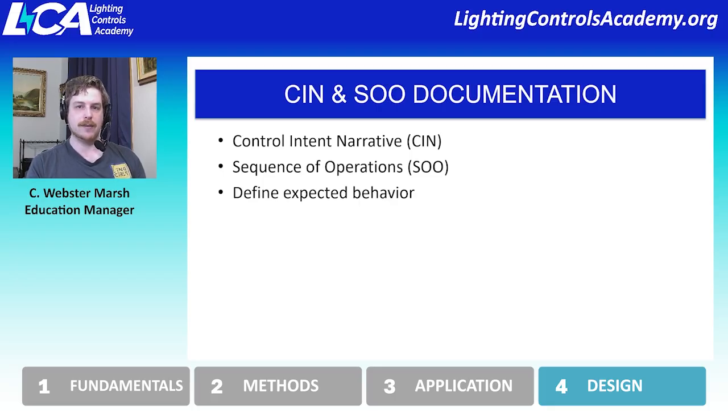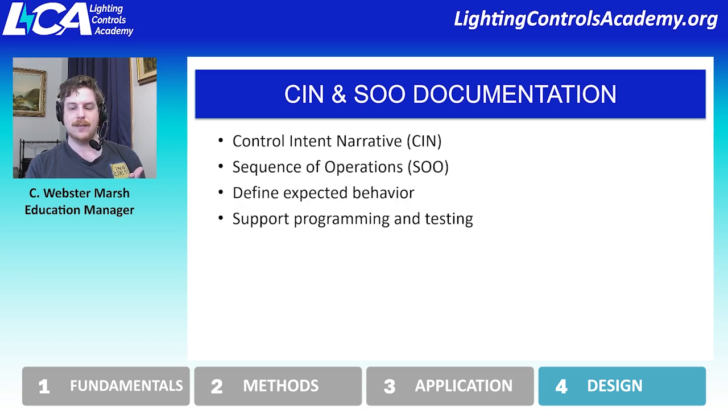Between these two documents, we will have clearly outlined what is expected from the system. And it will also support the programming and testing, especially sequence of operations, because you'll have a document that you can point to as, say, for instance, you're a service tech. You can then go, okay, this is what I need to do for this space. This is what I need to do for that space. And then as a commissioning provider, you can use that as a checklist for functional testing.